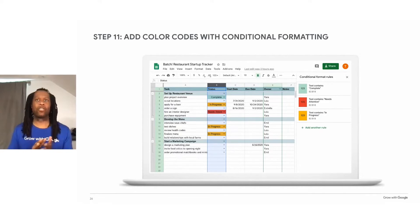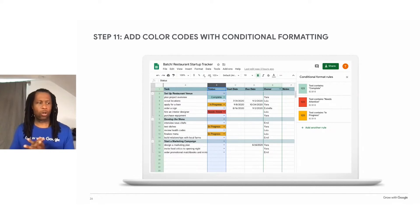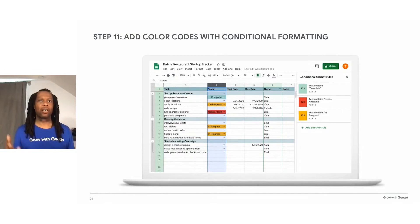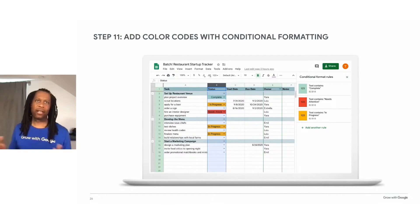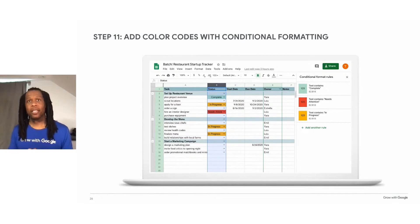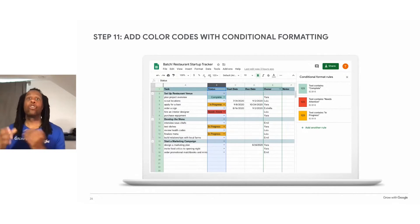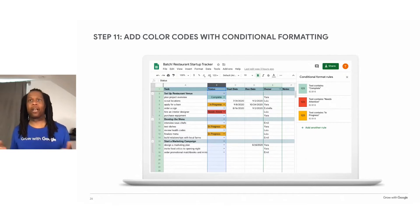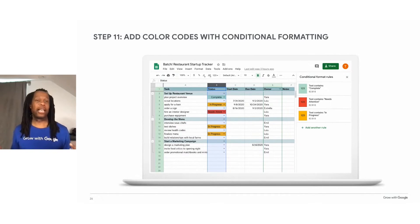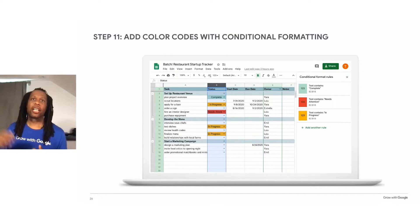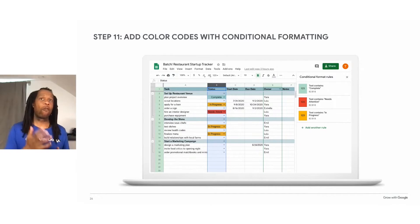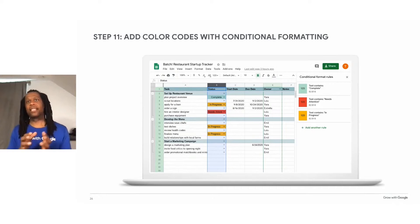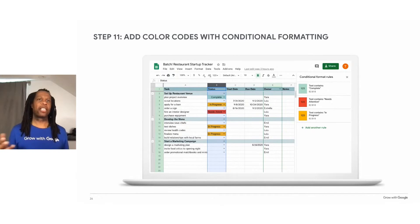The animation on this slide actually shows a user saving the data validation list. Then select the dropdown menu next to the task and mark it to complete. So when you're working with multiple collaborators on many tasks, you might also use a tool called conditional formatting. You can use conditional formatting to add color to certain cells. For example, you might want to change the completed items to green and any tasks that are held up that need to be reviewed in red.